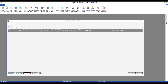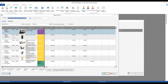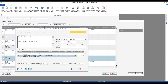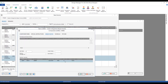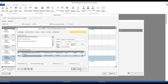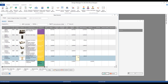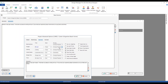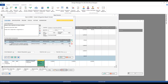Let's do another example, switching over to Carter's Brigantine Beach Home. Our king bed shows $302 of freight, but our stone table has no freight listed yet. I have no freight associated with the estimated price, even though we did record the distributed freight of $90.28 in our freight distribution example. The reason is that our freight is set to 'Always Proposal' — so if nothing is typed in for the estimated price, there'll be no freight price for the client.